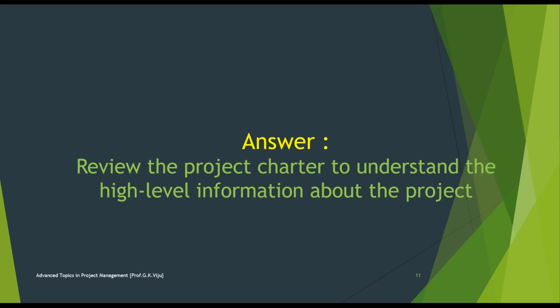The question states that project planning is about to begin, which suggests that project initiation has been completed. The project charter is created during the develop project charter process as part of project initiation. The project team uses the project charter as a starting point for initial project planning.